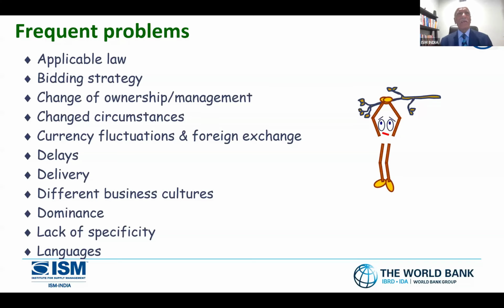I remember the days in 1992, we were doing a project in Zimbabwe. Excellent currencies, but then within 2 years it collapsed by 30%, 40%. So then we had this issue. How do we handle such a situation? So certainly for currency fluctuation, we do the hedging part. I won't be going too much into depth of it. If I know my currency is fluctuating and is very volatile, certainly I will do the hedging part. Otherwise, it's too difficult to manage.